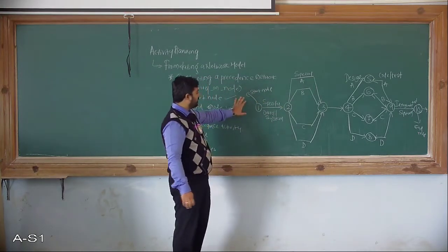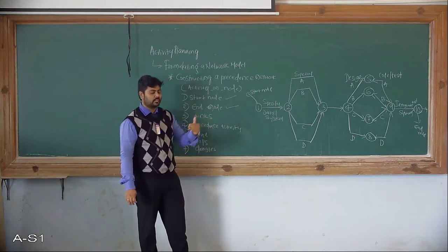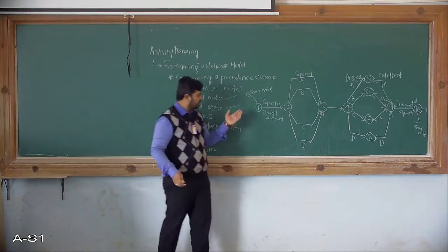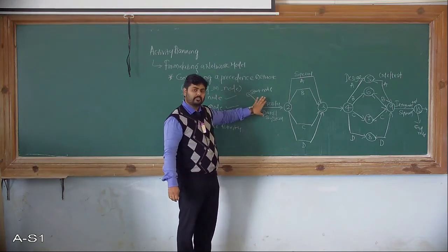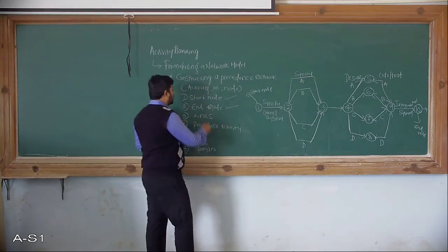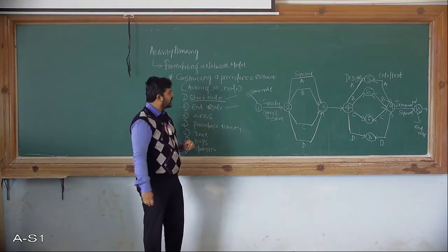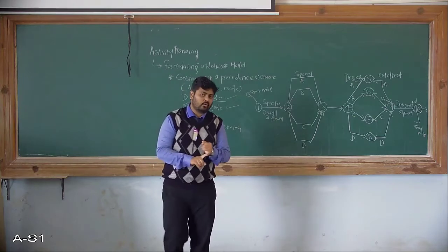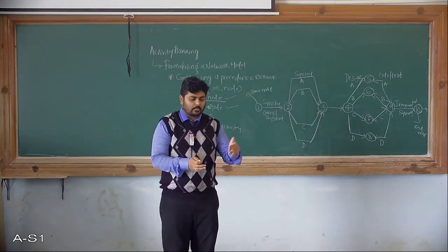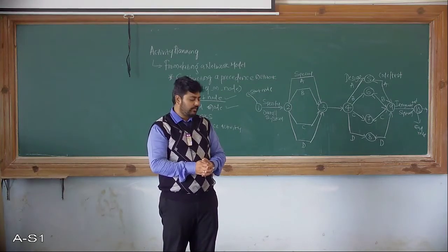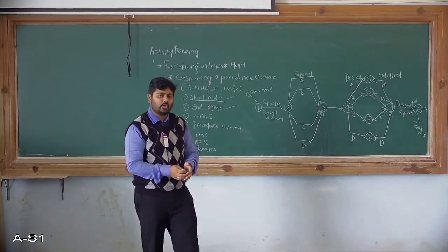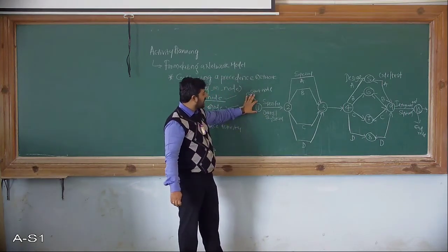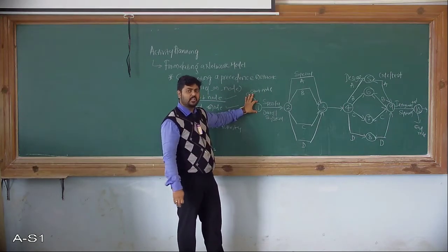So start activity means any one of the activities which is ready to proceed. Okay, if the resources are available to execute that particular activity, then you can start with that particular initial or that start node can take initiation and you can start with the project. So at least one of the activities which is ready to proceed, then you can go for the start node, or else there are some situations which you can run parallelly if the resources are available. So in that case you can start with 2 or more modules subsequently which are independent in nature in the project. So in that case at the same start node you can start with 2 or more different types of activities.